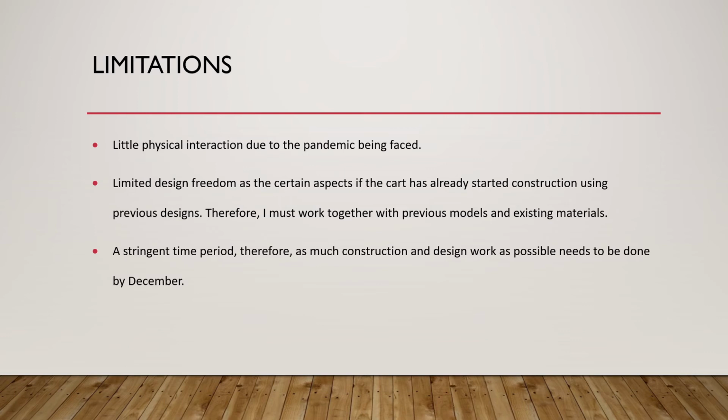Secondly, as the frame has already been started and materials are already purchased and cut, I am faced with limited design freedom. I must work with the existing material and design. Lastly, the time frame in which the work needs to be completed. The technicians have already started construction and they want to finish as much as possible by December. As a result, I have limited time to do research and have to prioritize their needs, for example, sending design or design changes, buying materials, and just guiding this process along over other aspects of the project.